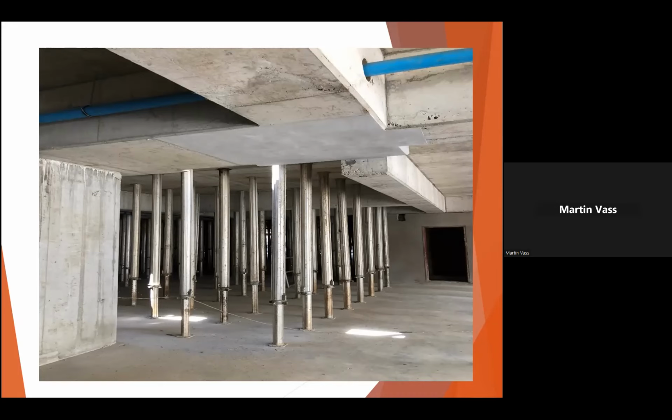That is why they stopped all work. They didn't know what the problem was at the time. They stopped all construction work, and they started bringing all these props in to hold the building up until they established where the fault was. It took them something like 4 weeks to establish exactly where the fault was. So in the interim, they brought all these props in. So how do we know the failure? These beams started to crack. Noted. Thank you.